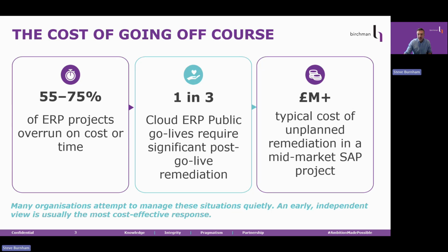SAP Public Cloud has specific characteristics that make shortcuts during implementation predictably costly at go-live. The platform is designed around standard processes and referential data integrity. When organizations try to replicate legacy complexity inside it, or when data quality issues in source systems are not resolved before go live, the consequences are immediate and visible across the whole business rather than contained within a single module.